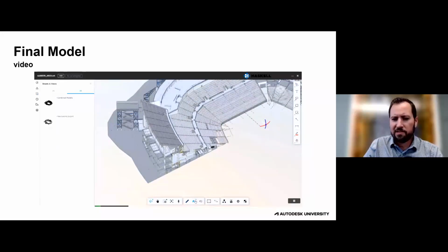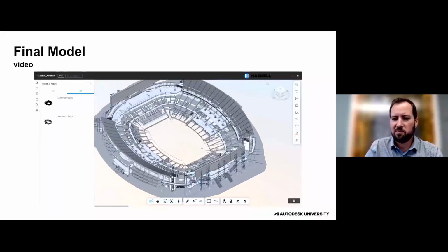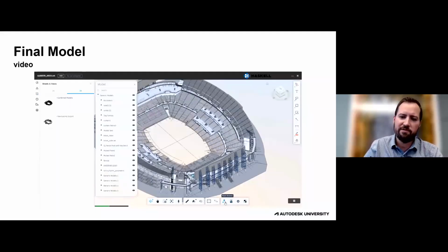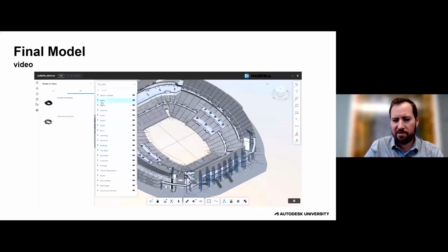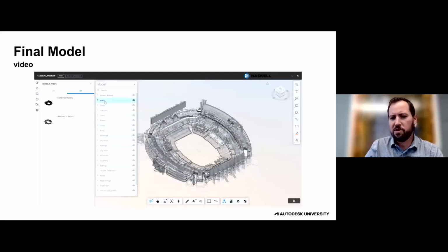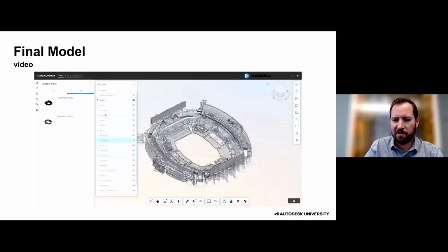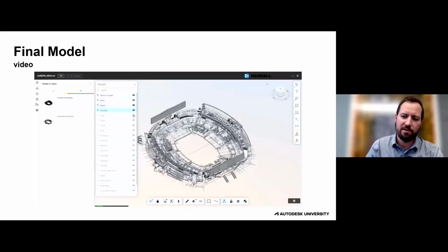We thought going into this that we could mirror a lot of the modeling, but it turned out that mirroring wasn't quite as easy as we thought. There were differences on both sides. Even the upper concourses and club areas respectively are on slightly different levels. They're close but different levels. As well, it's more of an oval shape, so it's not a circle that we can easily mirror around from area to area. So yeah, it was quite a bit of manual modeling. It wasn't as easy as we might have thought to copy and paste from other areas. It was pretty unique throughout.